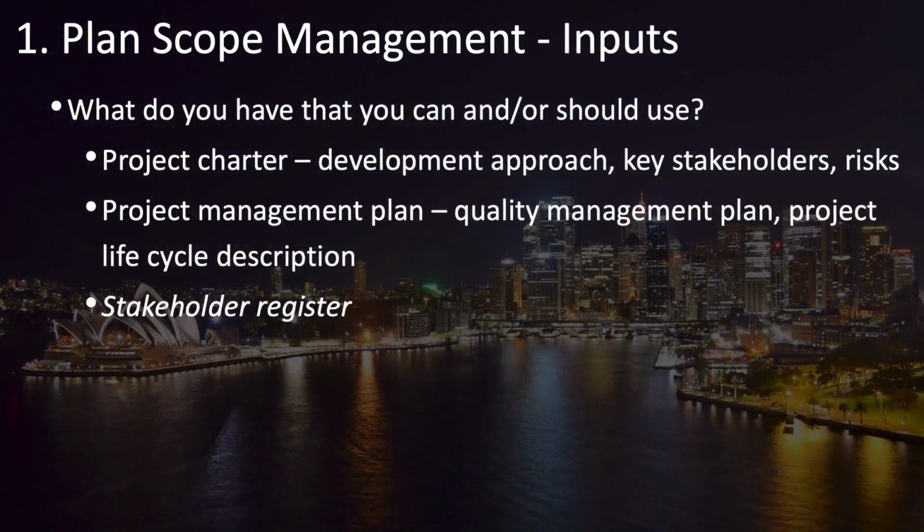Knowing what the outputs are of plan scope management, what is it that you have that you can or should use to create these outputs? If you think about it, you know that the project charter has been created and that should be an input to this and all of the knowledge areas management plans. It provides the overall development approach, a list of key stakeholders, a high-level list of risks and overall project risk, and much more information, including the list of deliverables that are expected.